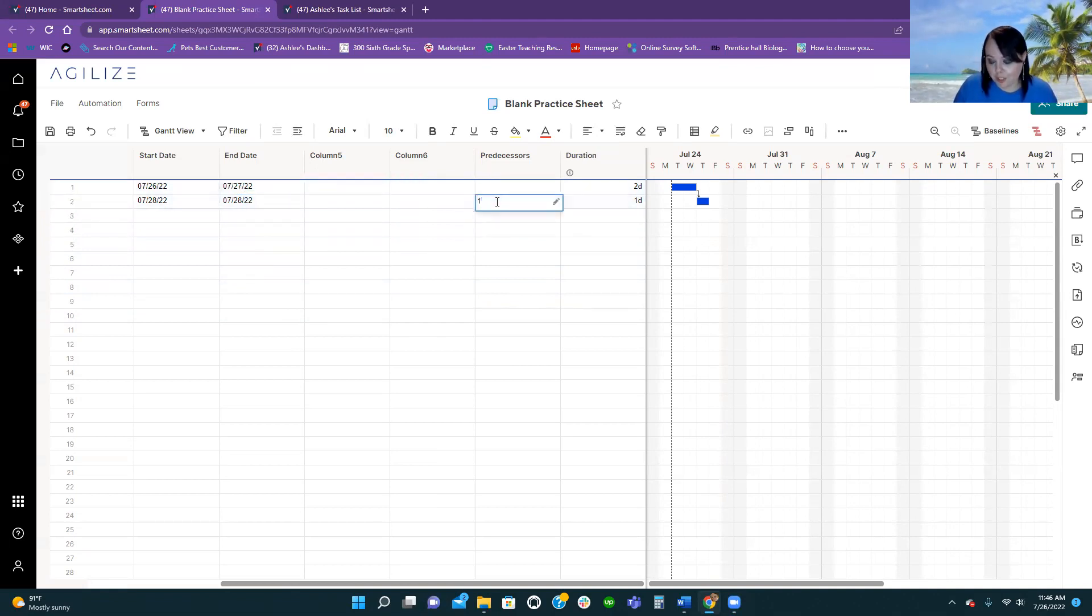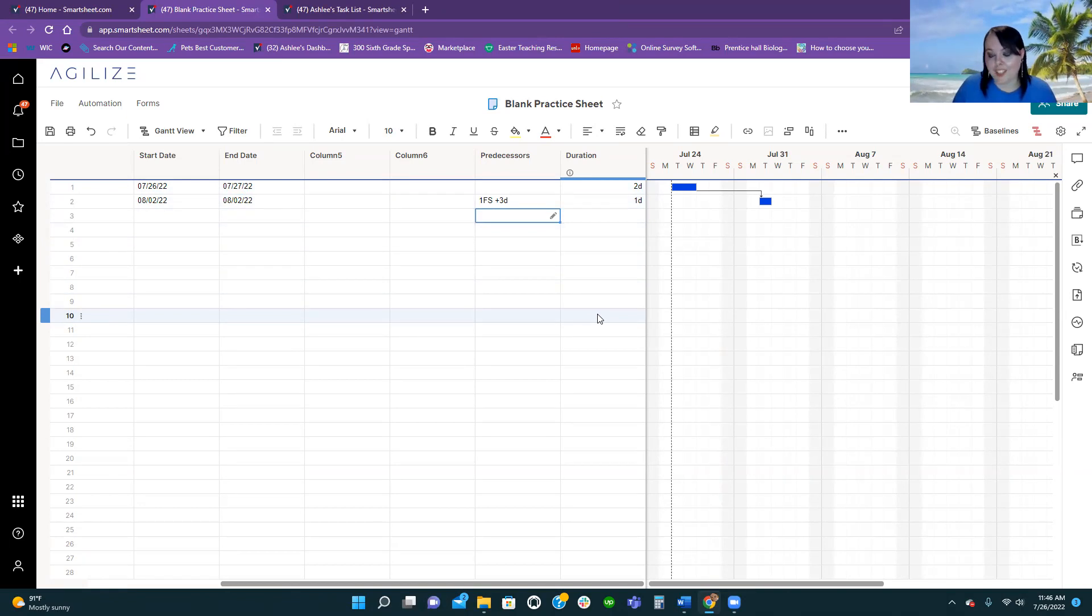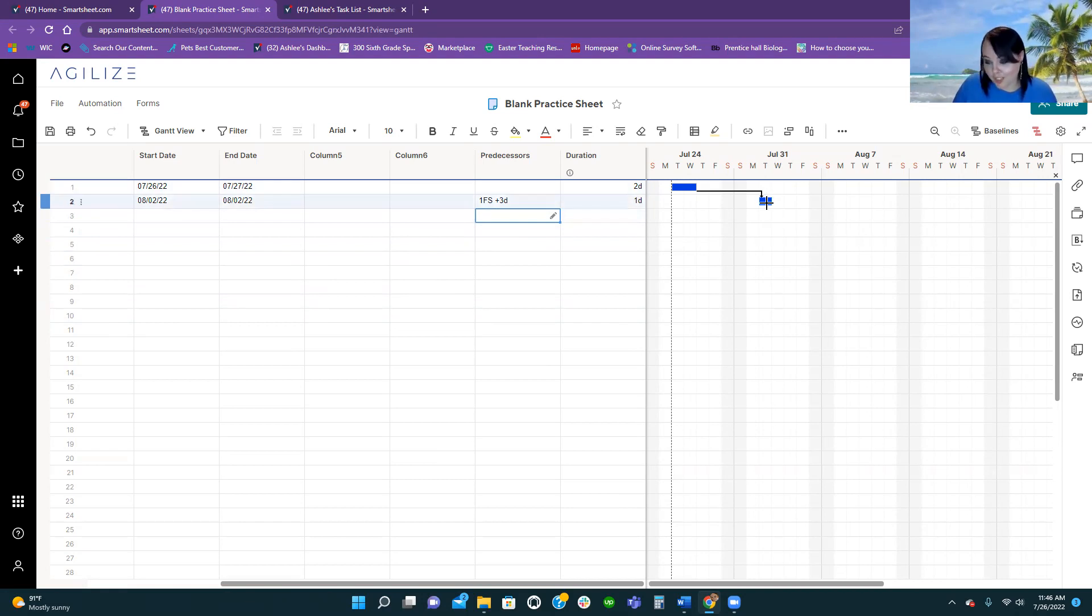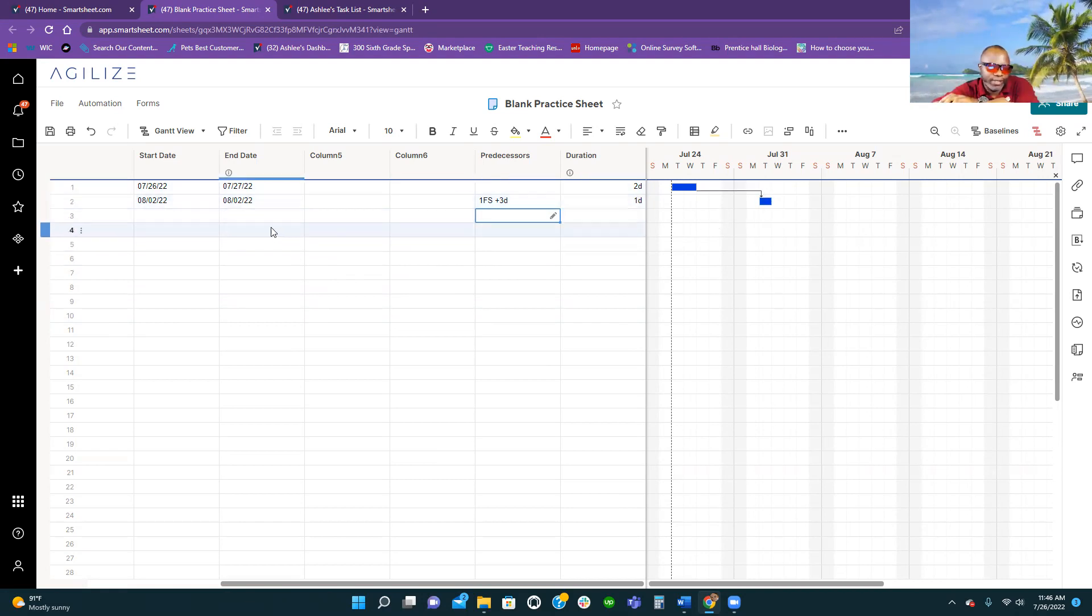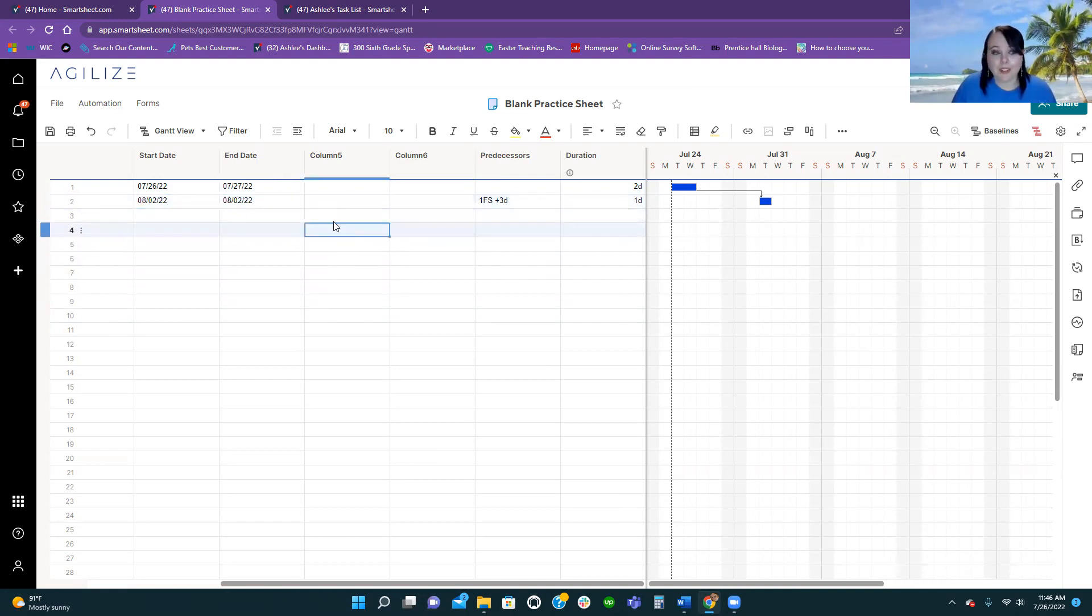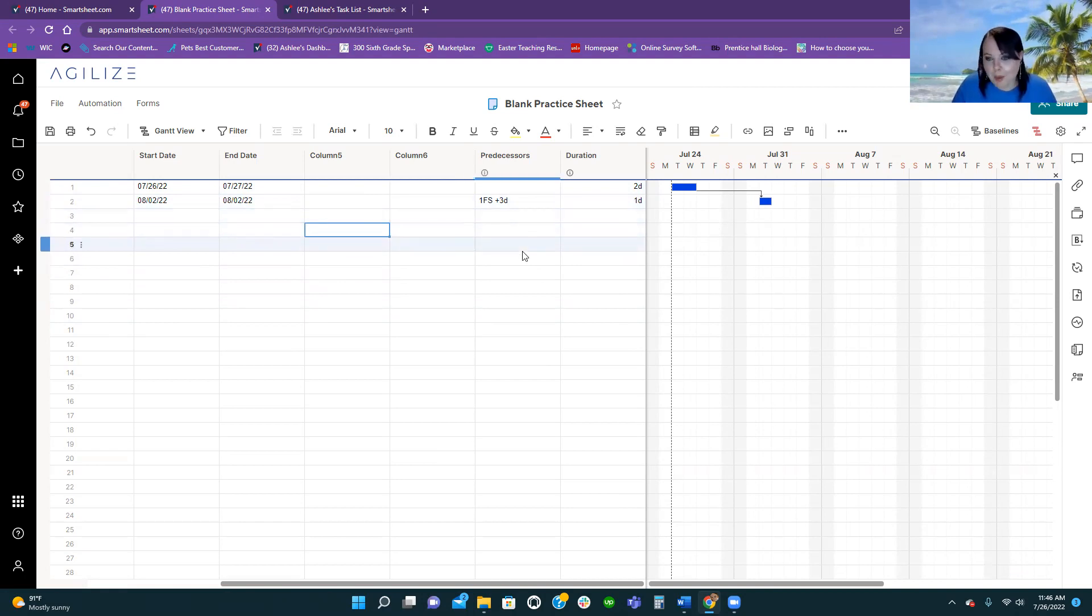So you just, and there you go, and it'll tell you when this task is finishing, you're going to add three days to it, and that's when it's going to start. That's pretty good. And it'll auto-update your dates as well. So, I mean, it's so intuitive, and it works so fast. You never have to worry again about missing a task.